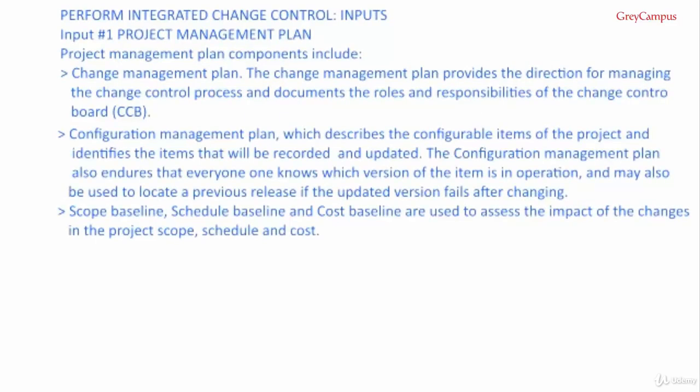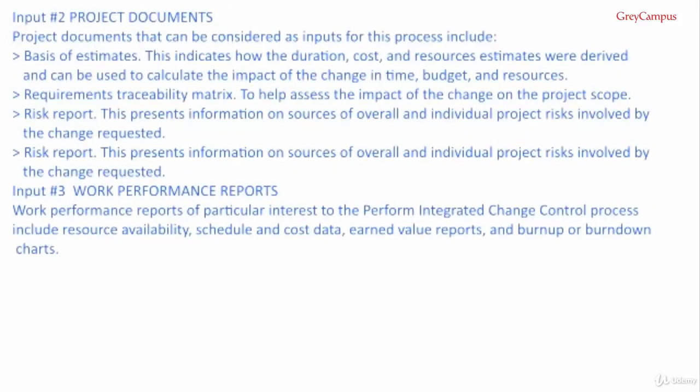The configuration management plan also ensures that everyone knows which version of the item is in operation. It may also be used to locate a previous release if an updated version fails after changing. Scope baseline, schedule baseline and cost baseline are used to assess the impact of the changes in the project scope, schedule and cost.